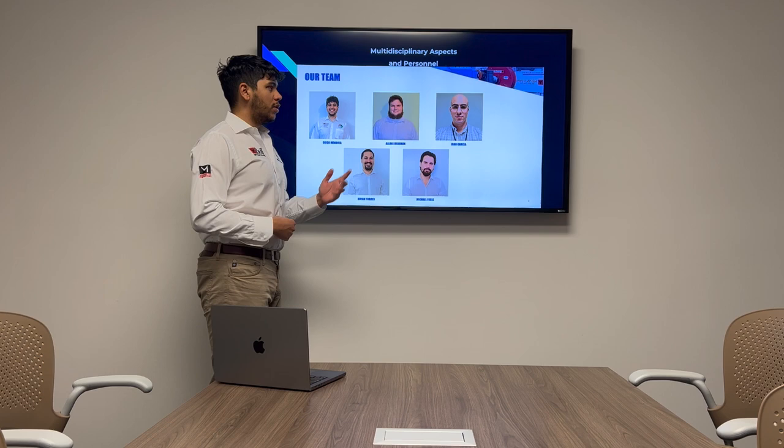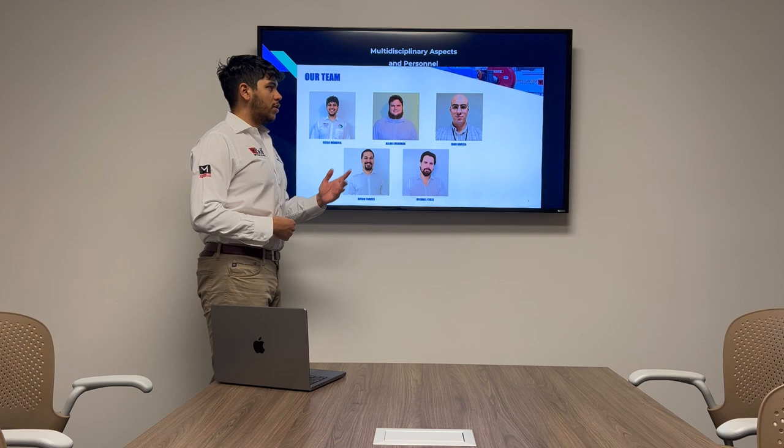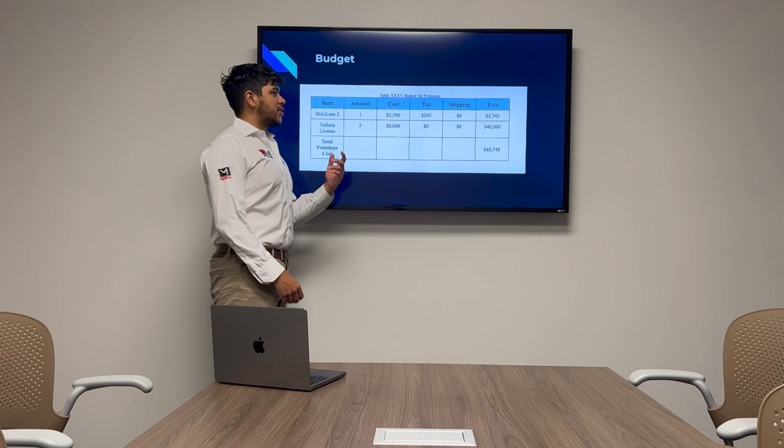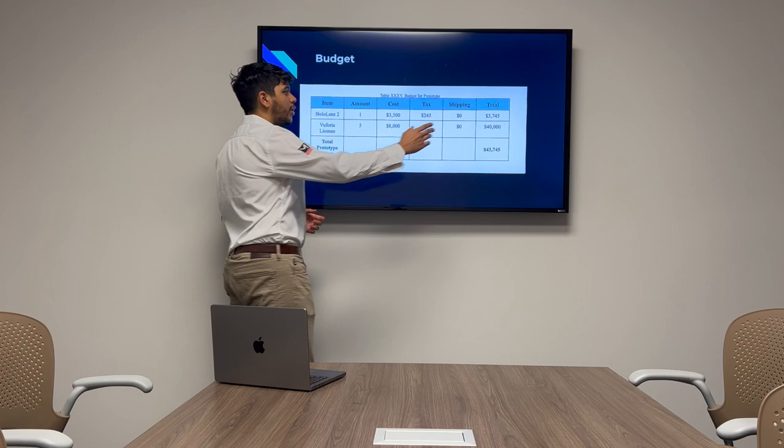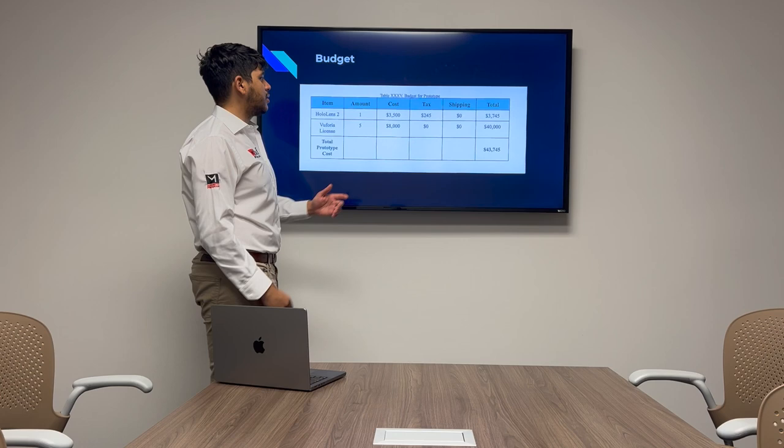Next up, we have our budget. Our budget is small in components, large in dollars. Our hardware component, one HoloLens, $3,745 total. And five Vuforia software licenses, $40,000 total. Total for the project, $43,000, almost $44,000.